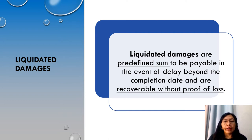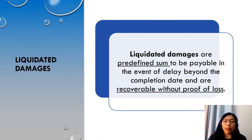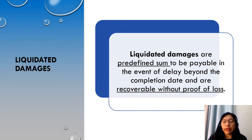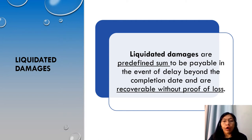Normally, the estimated amount for liquidated damages is deducted irrespective of the actual amount of loss resulting from the delay. Most contracts contain clauses for the deduction of liquidated damages. This allows the contractor to be aware of their liability if they become late, and therefore allows the contractor to consider the risk of delay in the pricing of their tender during the tender period.